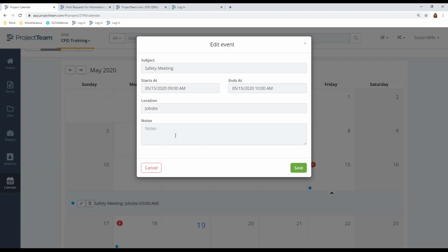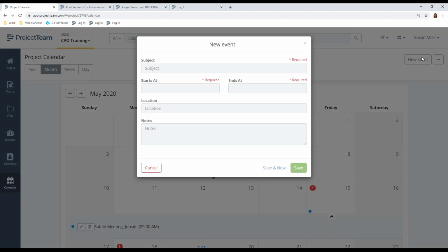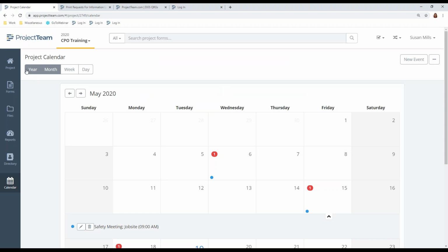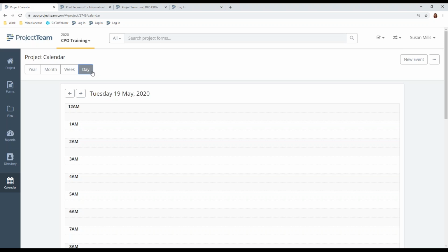You can click edit if you needed to edit it. As we are all working from home, a lot of us are meeting via webinar and things, so you could put the webinar information or the GoToMeeting information in here so everybody has that. It's really easy to add an event. You just click New Event, put in a subject, enter your start date and time, end date and time, put in a location and any notes, and then you just click Save. You can view this project calendar by clicking year, month, week, and day.